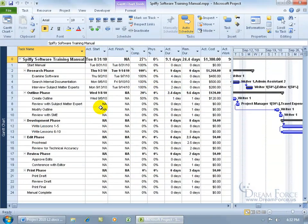As I mentioned in an earlier training video, you can use the variance table to compare your actual start and finish dates versus your baseline start and finish dates.